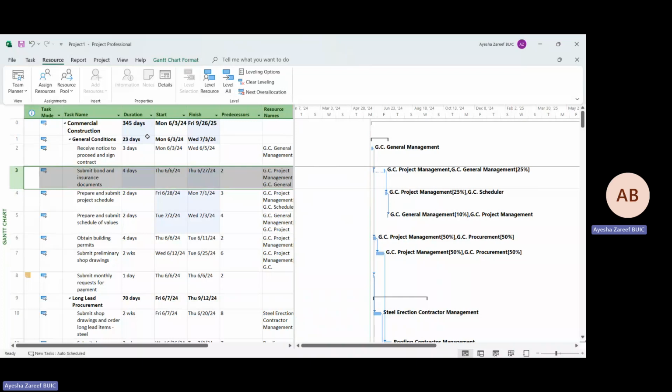So what has happened here is that, after finishing the particular task, here in the Gantt chart view I'm talking about these two particular resources, after finishing this particular task, this resource has moved to the next, and then to the next, and then to the next, in order to level. So what does level resource mean? It adjusts itself in such a way that the duration is altered so that all my resources are evenly used. So that was about level resource.